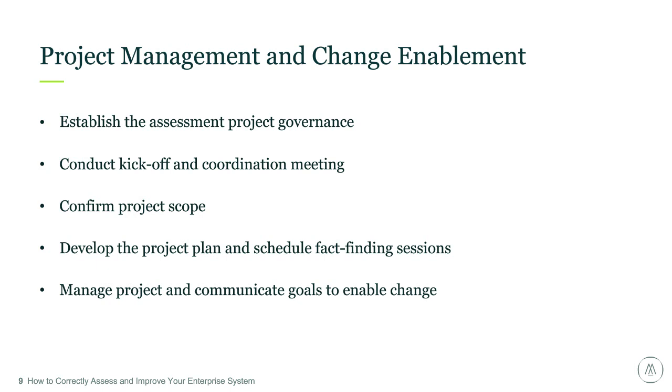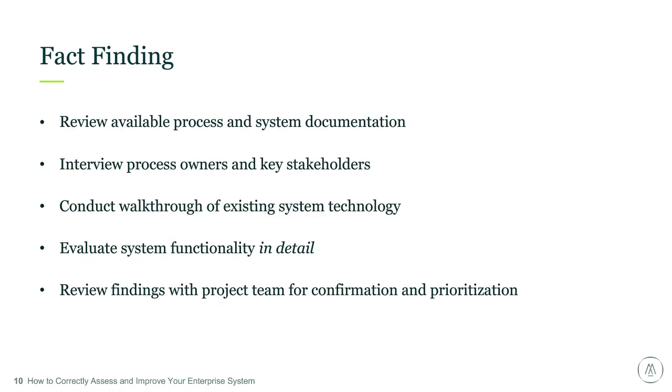So having established the foundation, you can then move on to the first phase of an assessment project, and that is the fact-finding phase. The goal of the fact-finding phase is to gather more information on the system issues and understand the main challenges and requirements. It usually starts with a review of available process and system documentation. Then you interview the process owners and key stakeholders who can shed more light on the challenges and pain points. Then you follow that by conducting a walkthrough of the system, looking at the underlying technology.